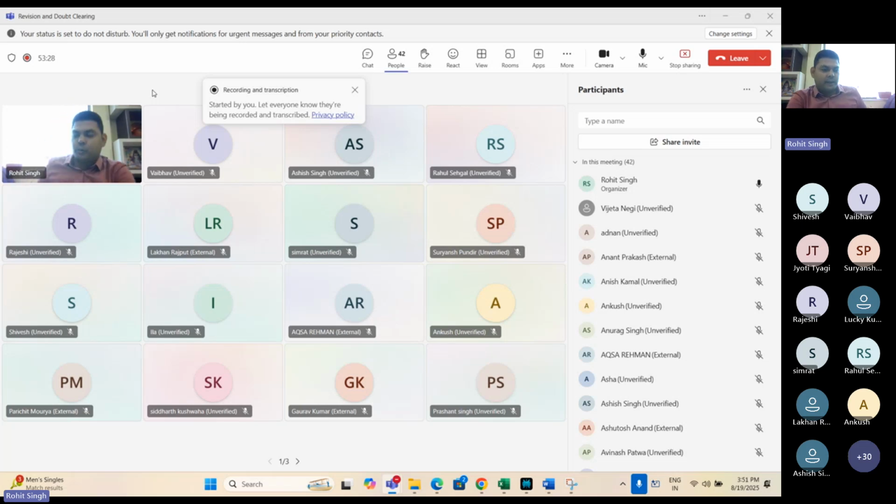And then of course, retrospective, which is sprint retrospective. It could be for one sprint, it could be for a collection of sprints. We used to do it on a every 3 months basis, every 3 sprint basis, or 6 sprint basis. In retrospective, we as a Scrum team, all Scrum team members, are available and we discuss continuous improvement. Whatever we have done good in the sprint, we keep on doing it and make it a habit. Whatever went bad, we do not repeat it. So we create a knowledge base and a reactive corrective action plan.